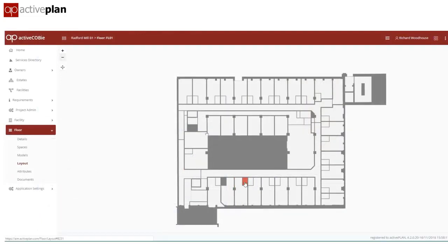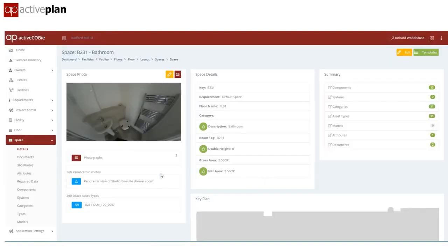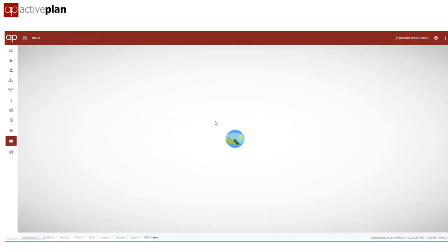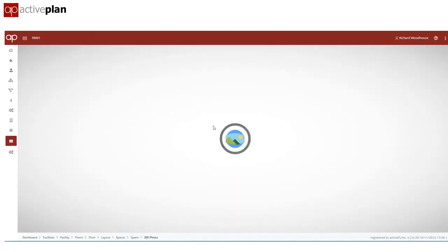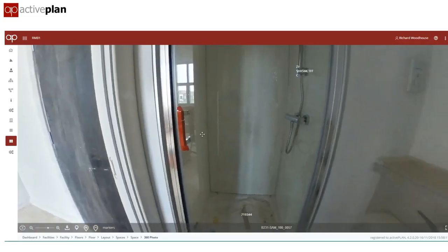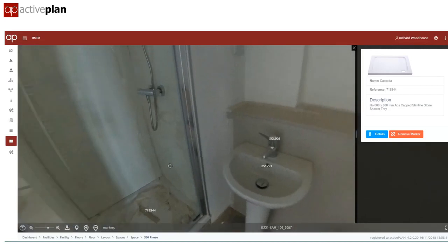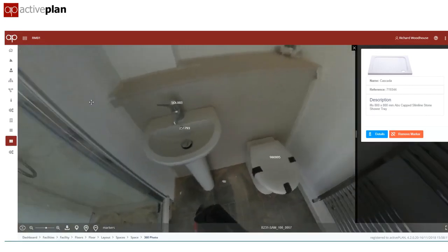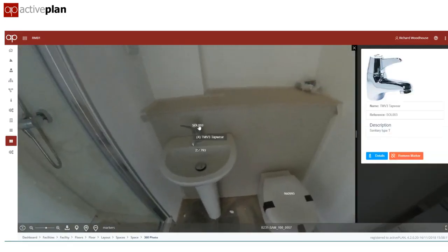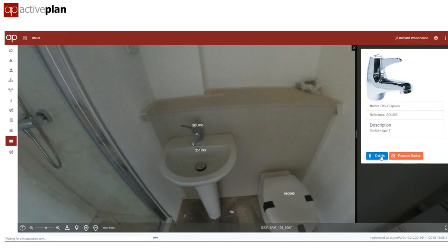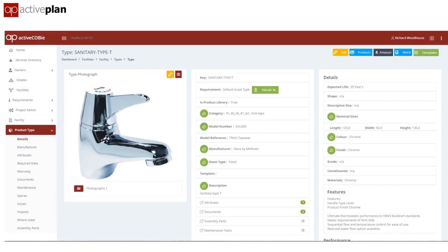If 360 photos are being captured, they can become part of the record information. Activeplan brings the 360 photos or point clouds into the asset model and allows individual specialists who don't need to visit the site to review them and tag them to the products in the library. We end up with an asset list for each room, enhanced with a visual record that will be invaluable in years to come to support condition surveys and compliance.